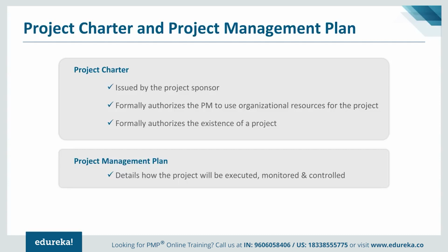Now, once these documents are in place, the project sponsor will hand over the project charter to the project manager. The project charter will typically include your high-level scope items, the background, the context behind why this project is initiated, a bit on the business case, etc. Who is the sponsor? Who are some of the key stakeholders? What are the phases involved in the project? Some of that information, including the acceptance criteria.